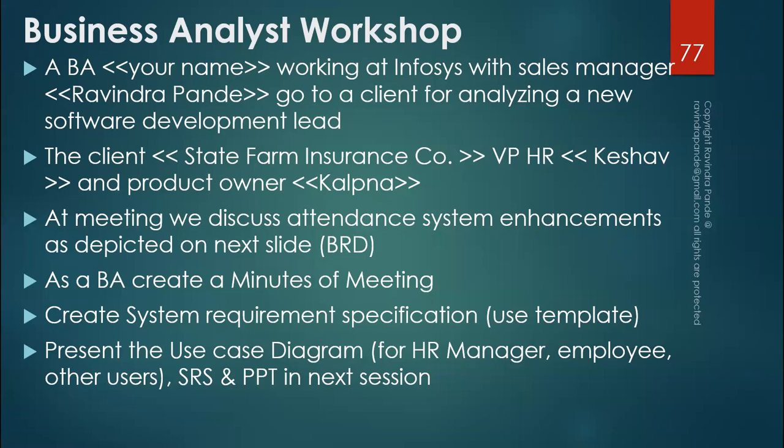Starts with minutes of meeting. Then we'll try to build the list of requirements in an Excel sheet. Then we build something like a high-level diagram. Then we build a use case diagram for one or at most two requirements. Then I'll include all these things in the SRS, plus some additional meat, and I will see what additional meat we need to add to the SRS. And this completes the SRS.